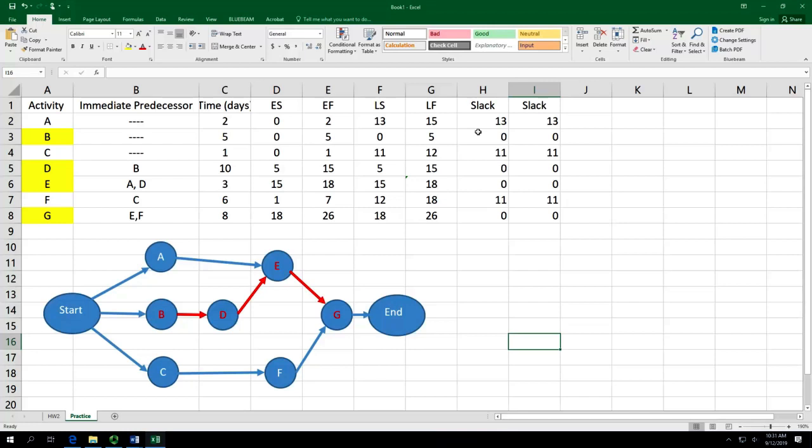You walked with me together, we slowed down, and it's not really hard. It's just probably for you, you are not familiar with the topic, it's going to take time. For me as well. So I need to slow down, especially when I need to apply the minimum or maximum rules. If you found some negative number, you get something wrong. If you found your slack time using the 2 formulas gives a different result, you did something wrong. You need to go back and check where was the mistake, okay?